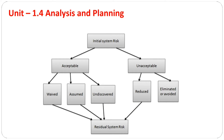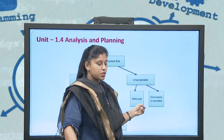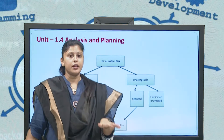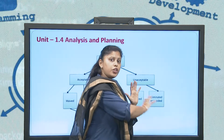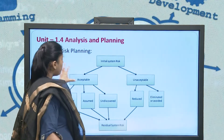Looking at the risk planning diagram: there is an initial system risk — certain risk is acceptable and certain risk is unacceptable. Acceptable risks can be eliminated easily, assumed based on prior projects, or remain undiscovered as unknown factors. Unacceptable risks are those not accepted at all for your software; such risks have to be reduced, eliminated, or definitely avoided. Once you reduce and avoid those risks, you get the residual system risk. This is a simple cycle of software risk planning.